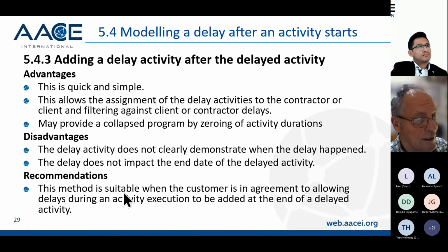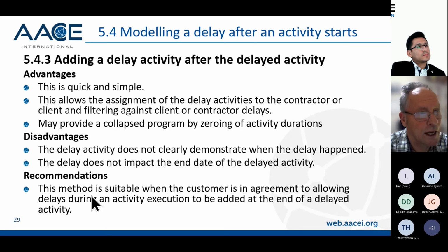And the recommendation is that this is suitable when the customer is in agreement to allow delays to an activity during activity execution to be added at the end. So you must have an understanding between yourself and the customer that you're going to model a delay during the activity by putting a delay activity at the end. It's not ideal, but it can be used.